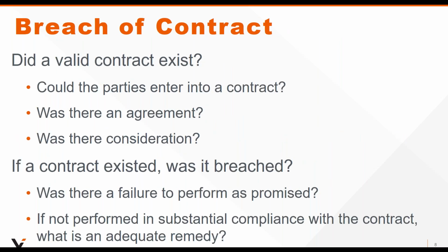And then, of course, you have your breach of contract claims. And this is oftentimes what you will be facing from your design builder clients. And courts would look to see, well, did a valid contract exist? Was there an agreement? What was the consideration? What did you all promise each other? And then did one party fail to perform as promised? And that is the element of a breach of contract claim.